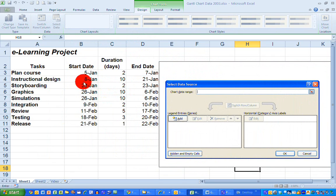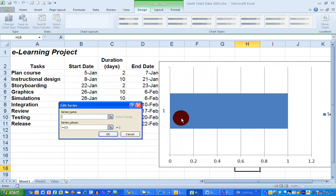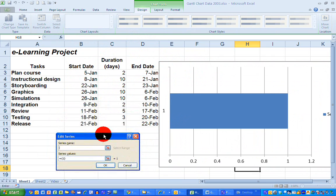I'd like to chart the start date and the duration that will give me my Gantt chart. So I'm going to click on the add here under the legend entry section, that gives me a little box here, which I am going to give the series name in this, the start date.